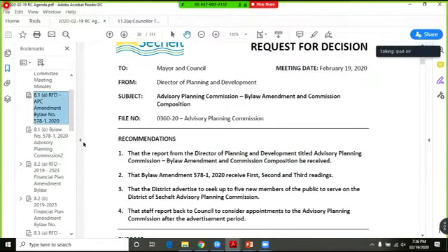This is the financial implication. The total estimated construction cost is $870,750, and the eligible contribution from the Investing in Canada Infrastructure Program is 73.33%, that is $638,520. And the district contribution from DCC and the 1% municipal assist factor, that is 26.67%, is a total cost for our contribution of $232,230. That is the end of the presentation. Any questions? Thank you. Any questions by councillors?